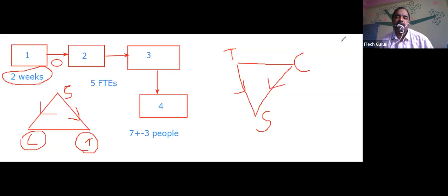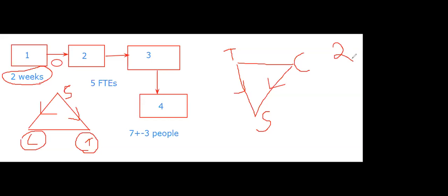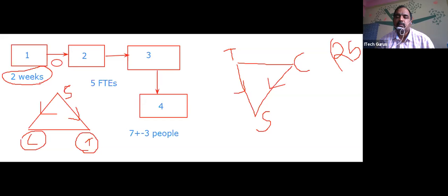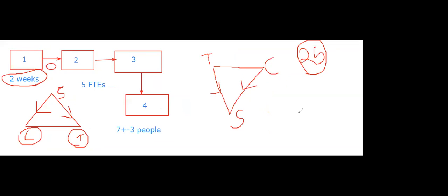If my project consists of, let's say, 25 iterations, I know what is the timeline for the whole project. I know what is the cost of the whole project. All of you, is that clear? Okay, but what is not fixed? The scope is not fixed.